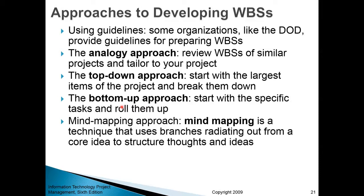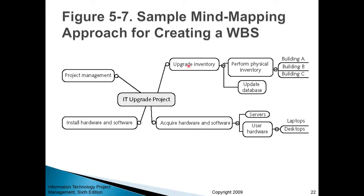Then there's the bottom-up approach. Some people aren't good at thinking at a high strategic level, so they prefer thinking about specific steps needed to accomplish the scope statement, and then organize those small items into more general categories. Or sometimes you use a mind-mapping approach — a creative approach where you start with the overall idea and create branches. For an IT upgrade project, for example, you'd branch into upgrading inventory, acquiring hardware and software, installing hardware and software, and add further leaves organically.